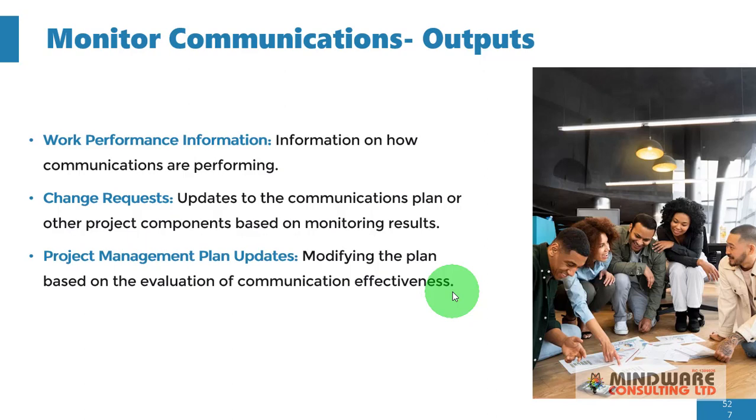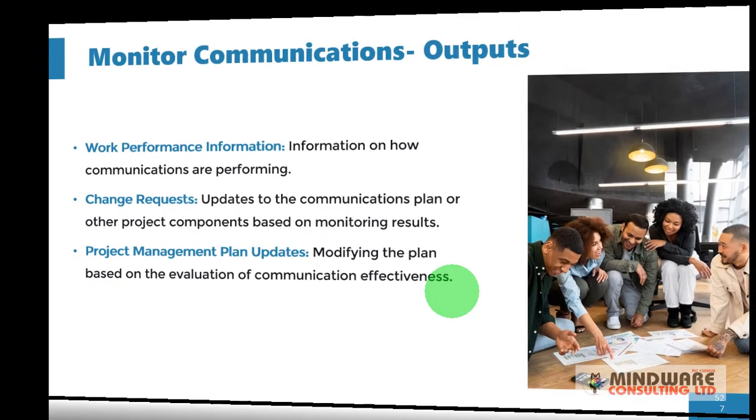As you evaluate this, it helps you to modify the project management plan. Of course, what you are modifying or updating in the project management plan is actually the communications management plan, because that one is included in the project management plan.